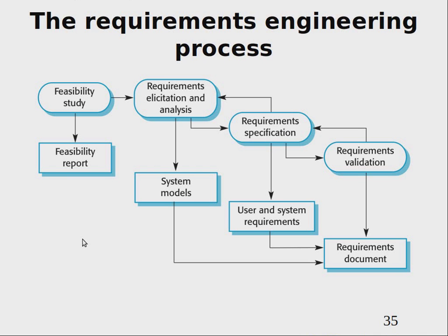But when this feasibility study is done, and it shouldn't always be very formal, you just think about possibilities, etc. In many cases, the outcome is just don't change anything, because what may happen after that is so costly that the benefits coming from all these changes may not be big enough to actually start doing this. But if you decide that changes are needed, then you go through requirements elicitation and analysis.